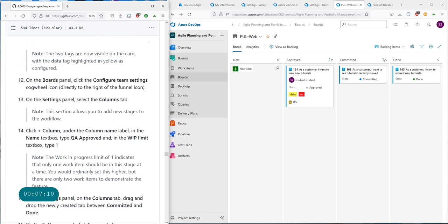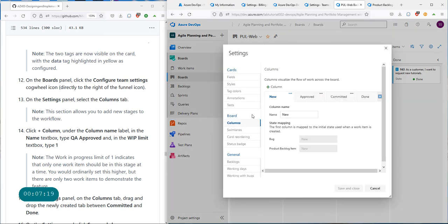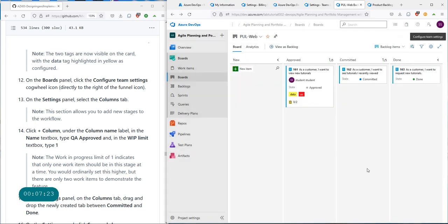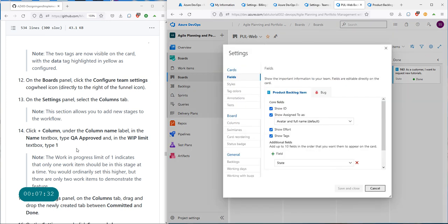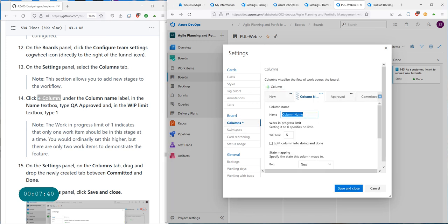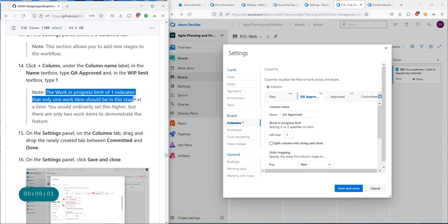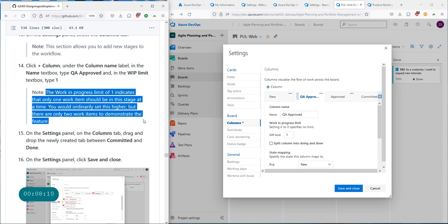Next, on the board panel click on the configure team settings cogwheel again. On the settings panel click on the Columns tab. These are the columns we're going to configure: new, approved, committed, done. By default there are four — you may need more. Click 'Add column'. Add a column for 'QA Approved', and in the WIP work in progress limit text box set it to one.